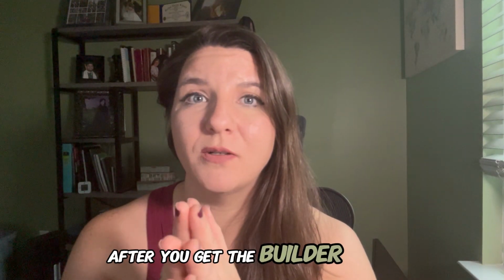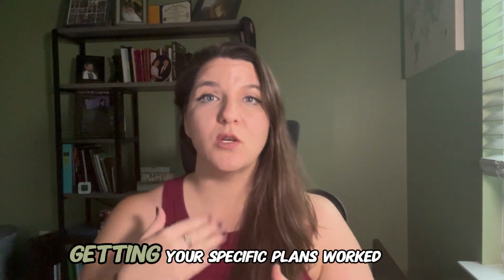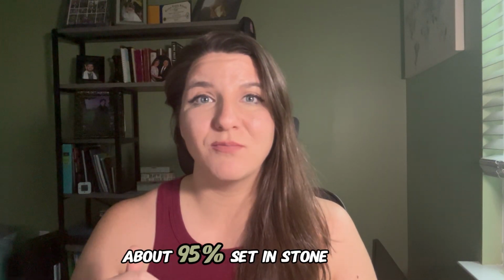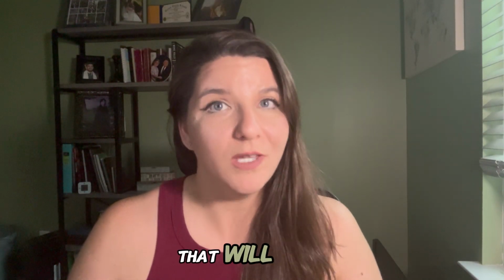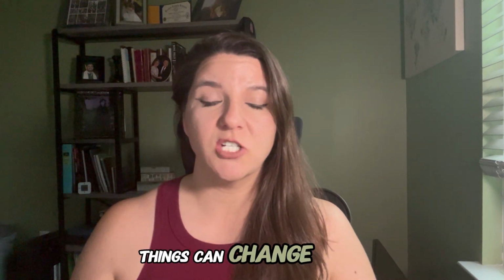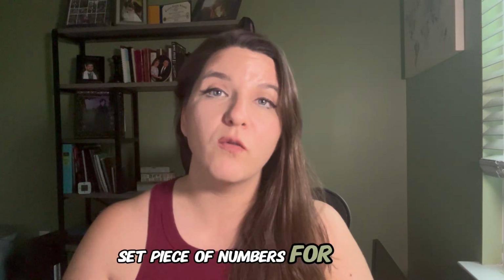After you get the builder approved, you're going to want to talk specific plans, getting your specific plans worked out and nailing down cost. Now, cost will probably be about 95% set in stone before you find land, because there are some things that will depend on the actual piece of land that you're getting. If you have to dig a well super far, things can change. So get a very comfortable set piece of numbers for the builder.